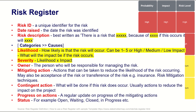You also need to describe how the risk can be mitigated — a mitigation contingency plan and action. You need to record the progress on that action and clarify the status of the risk, for example whether it is open, in progress, or closed. This risk register file is very important to prepare before the project, and it will be used during and at the end of the project to check if you achieved your plan. It can also be used for future projects.